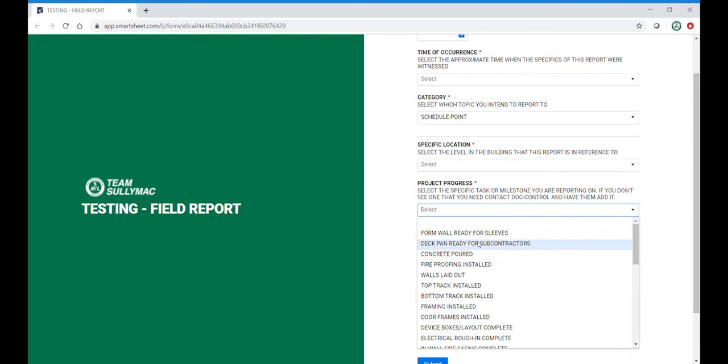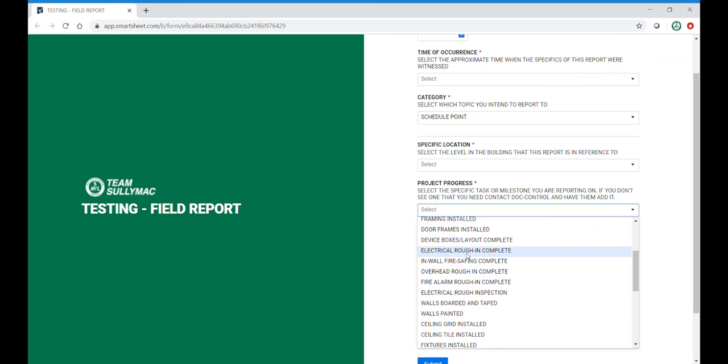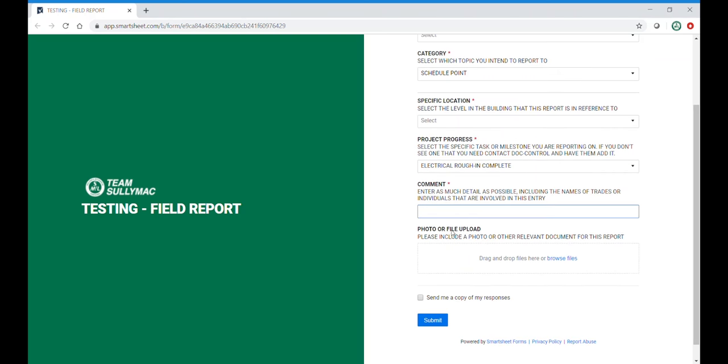Deck pan ready, concrete poured, and also electrical activities such as rough and complete in a certain location. Type in your comment, upload a photo, click submit.